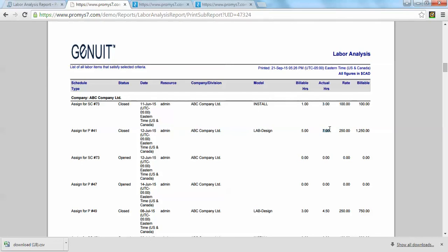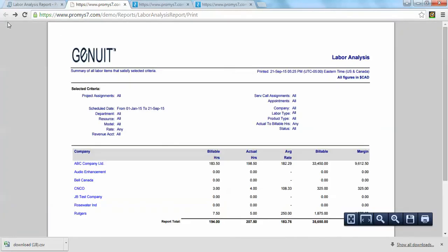And maybe the company just needs to give that resource some feedback saying, no, that has to be a change order. Or the other thing could be, when this resource does this kind of work, it always takes them longer than the estimate or the average, and so maybe that resource needs some more time for training on that particular task, right? And that's just one example.